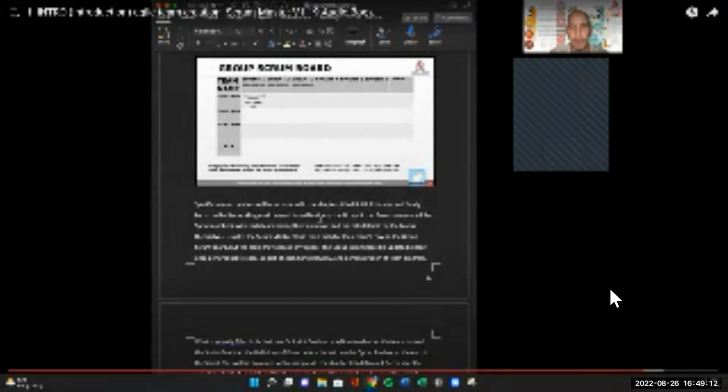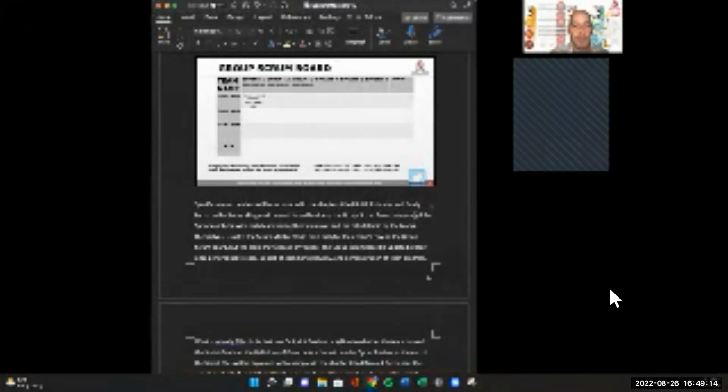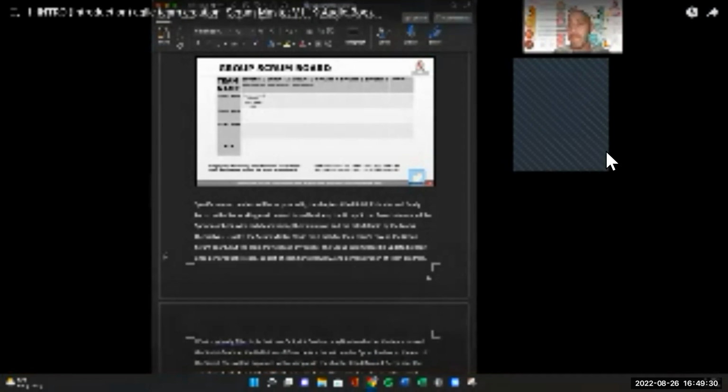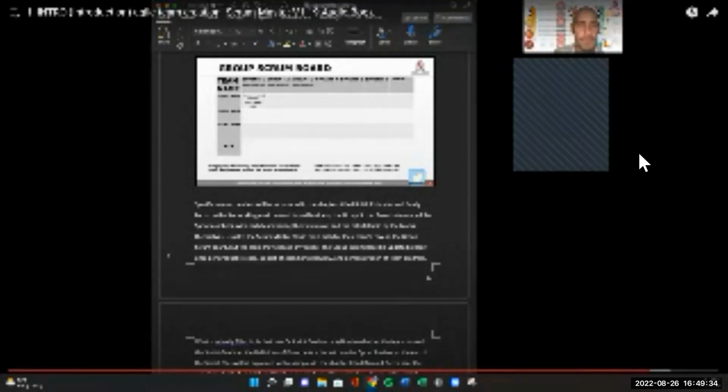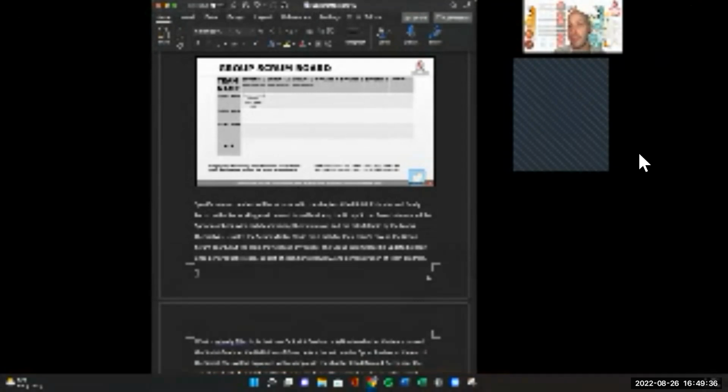In the live working environment in real businesses, the group Scrum board columns will be sprint numbers, with each team having their own row and the cells filled in by the teams themselves. So you don't have some master group that populates this. The teams themselves populate it. That lets you know, as someone facilitating agility across the company, which teams are not participating, because you can see their group Scrum board stops being updated. So you know to either coach that team or sell off that team, or if you have to, stop paying that team if it's really, really bad, because you can see who's engaged, who's participating. And at the level of efficiency they're engaged.